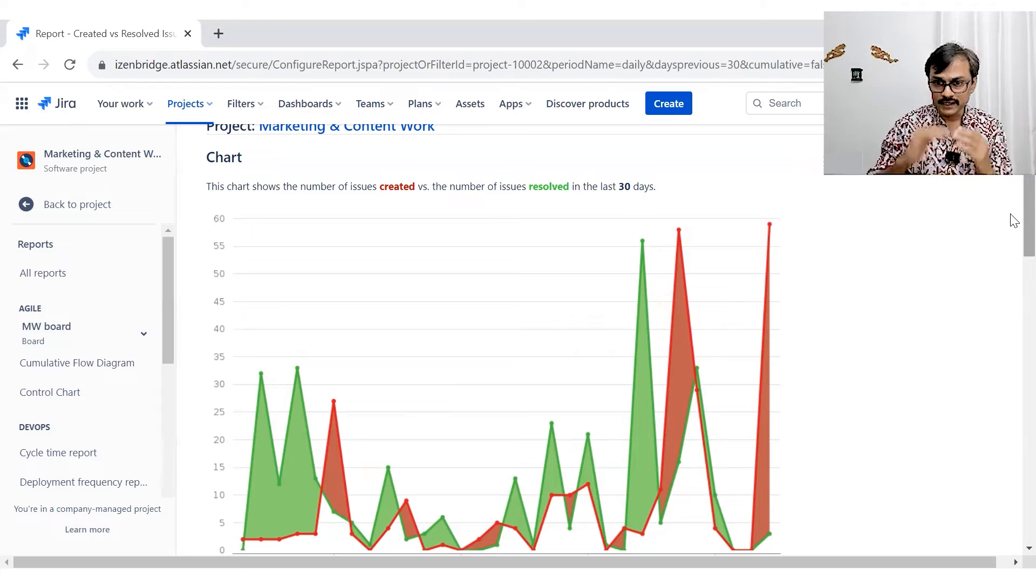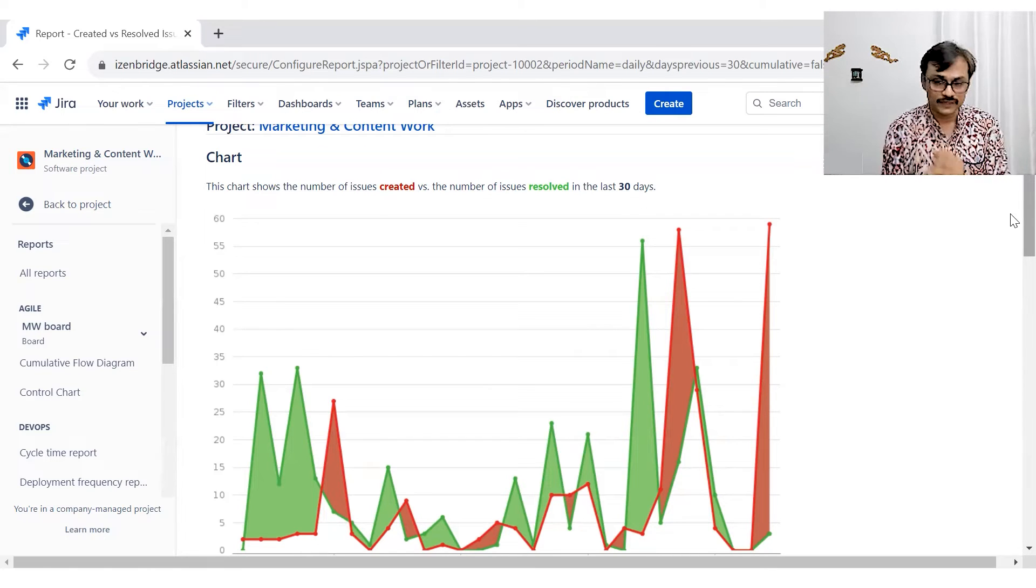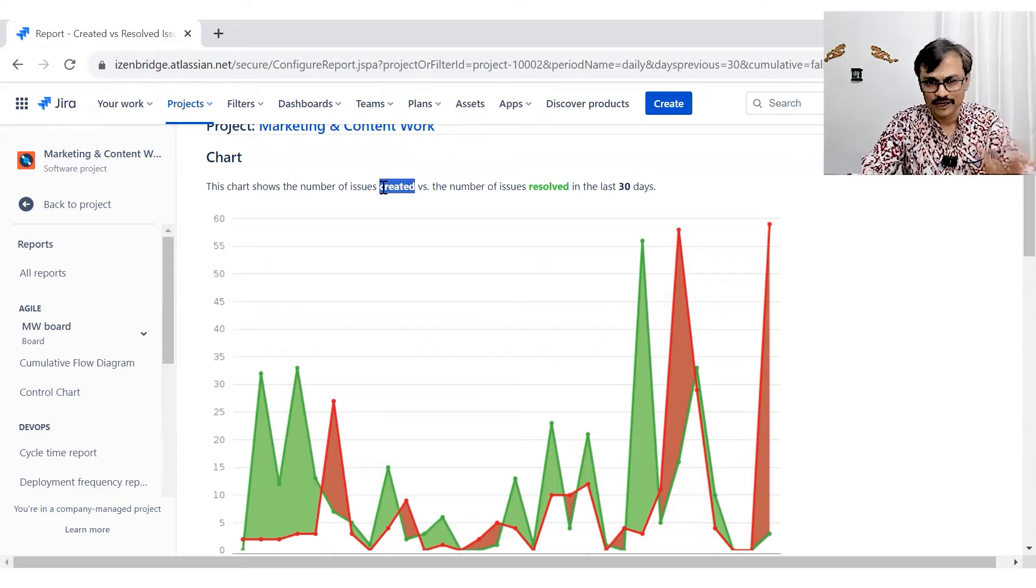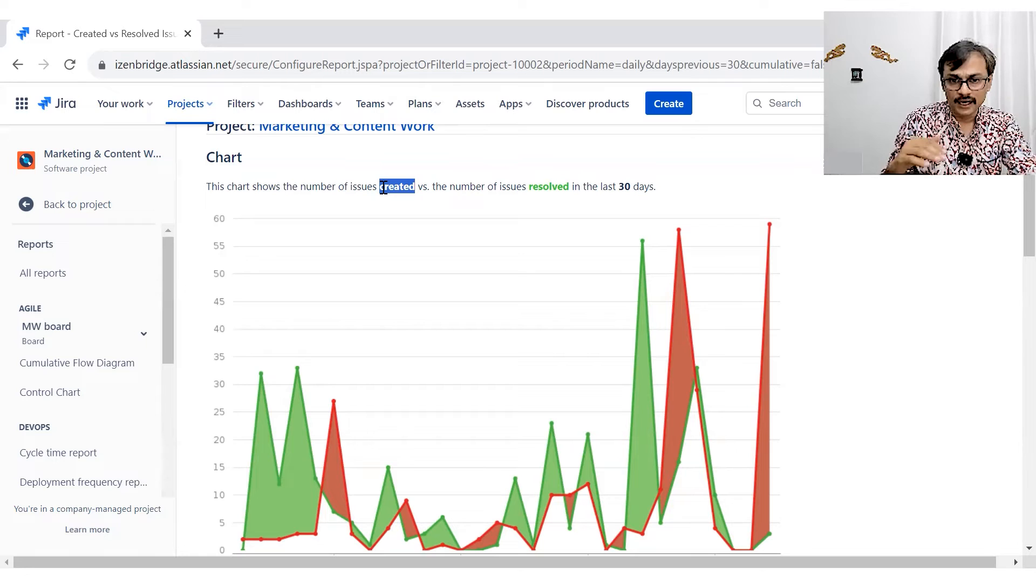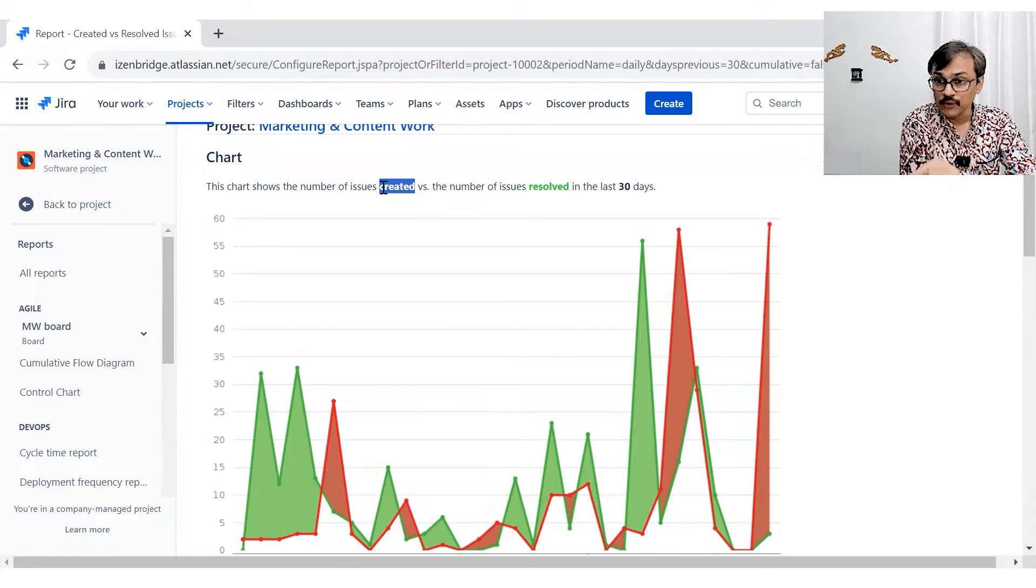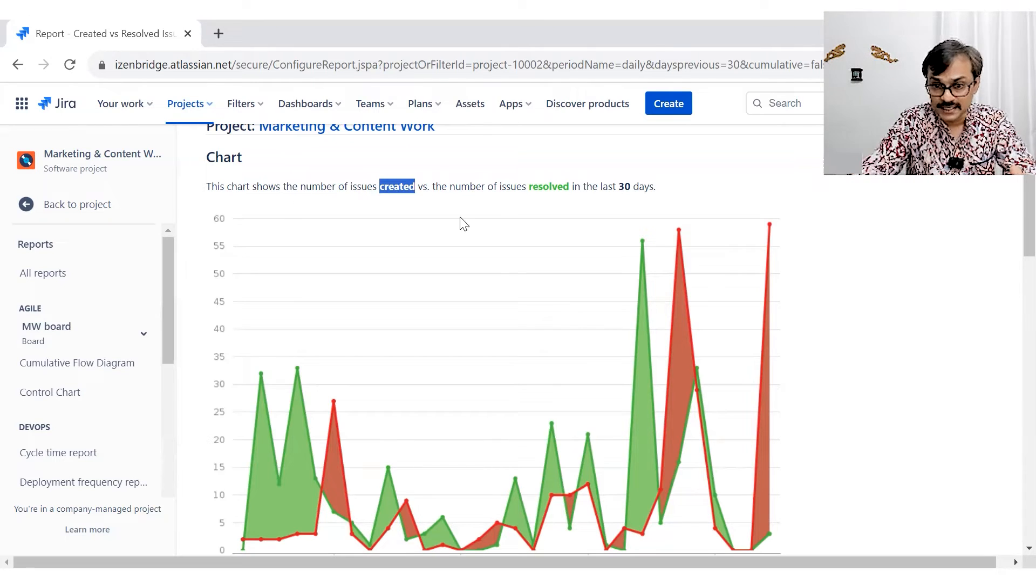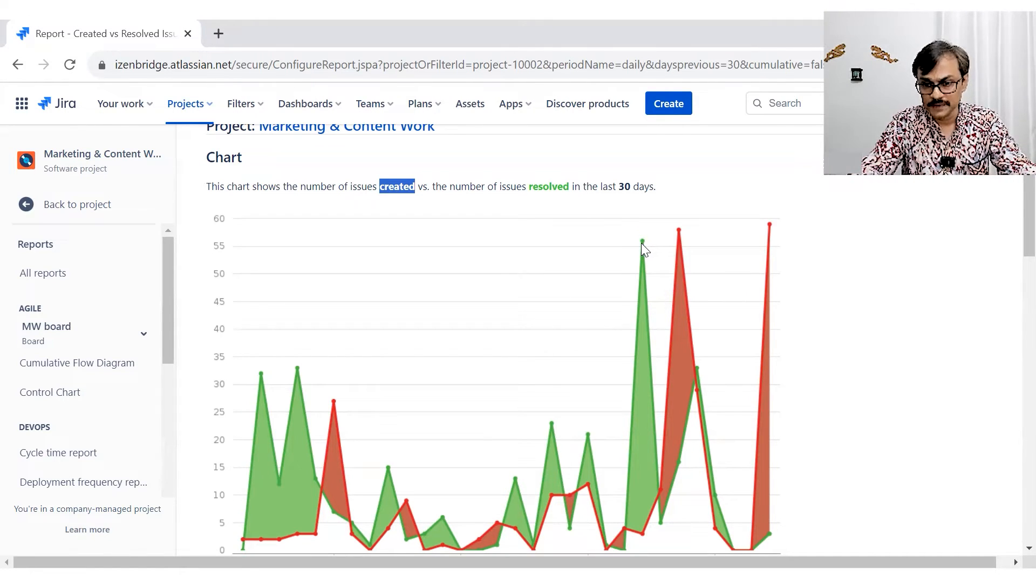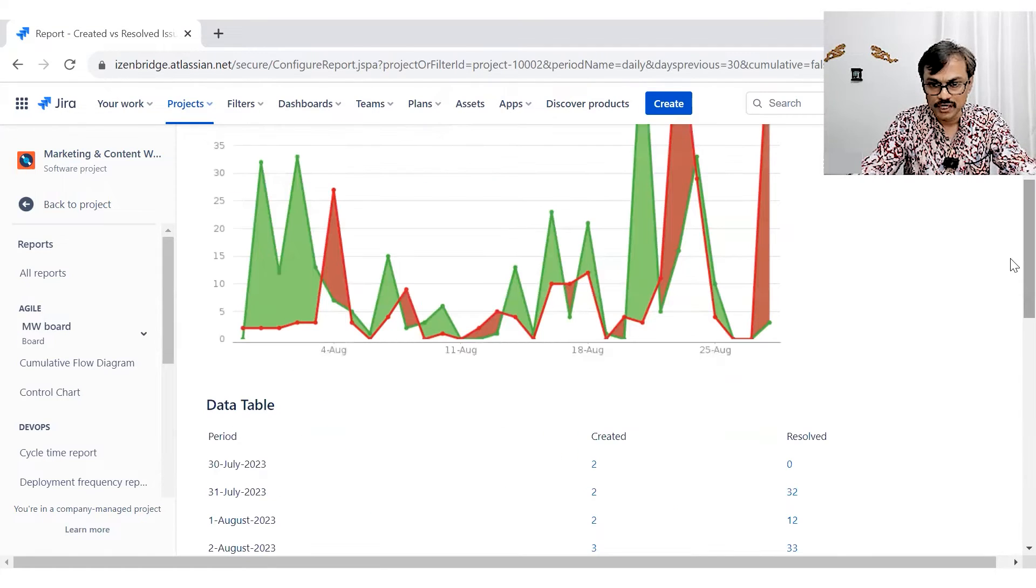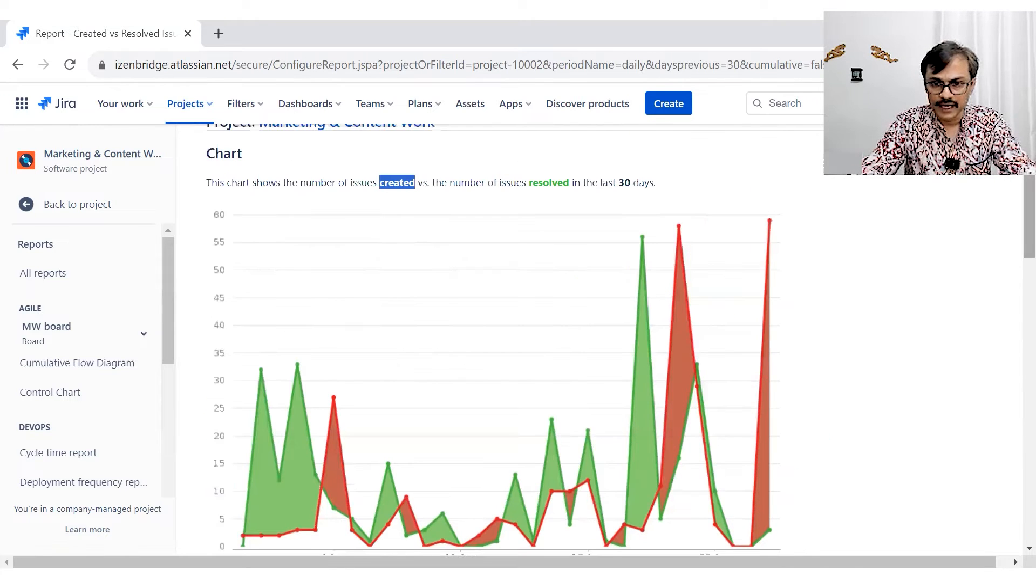Whenever the red line is going above green line or whatever the color you see, the created line, let's say a created line, not a pure red. So created line is going above the green line. I know that in that particular time period, we have more issues getting created and less issues going resolved. Whenever I see the green line was ahead of it, I know this particular day, we resolve lots of issues. So you can see somewhere here, we had three issues got created and we had say